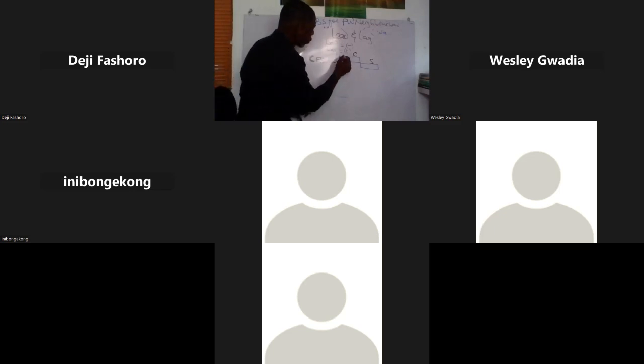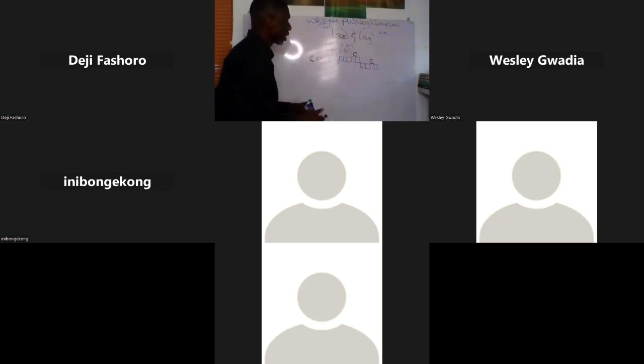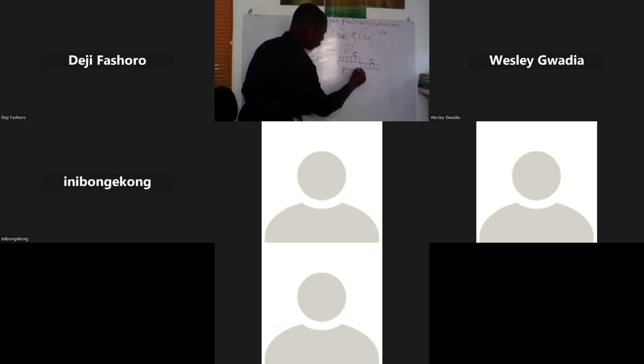So let me divide this column work into 5 boxes. Let's just assume 1, 2, 3, 4, 5. It's a 5 days activity. And let me divide this substructure work into, let's say, 4. Let's say it's a 4 days activity. So a 2 days lag means I want the substructure advanced by 2 days. See what the relationship will now be. This is my column with 1, 2, 3, 4, 5 days. And then this is my substructure with 1, 2, 3, 4 days. Can you see?